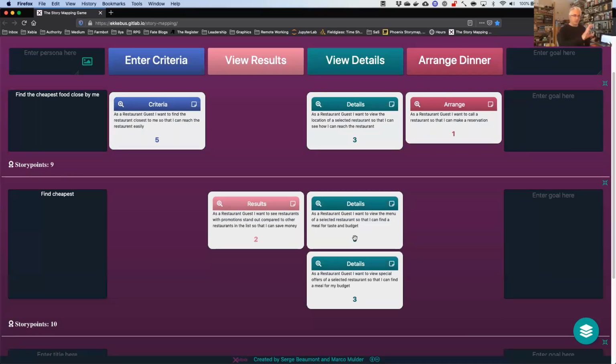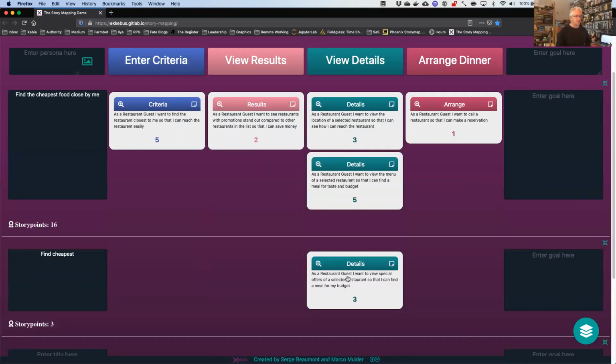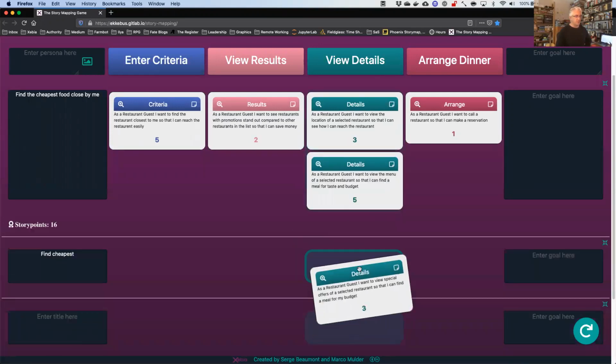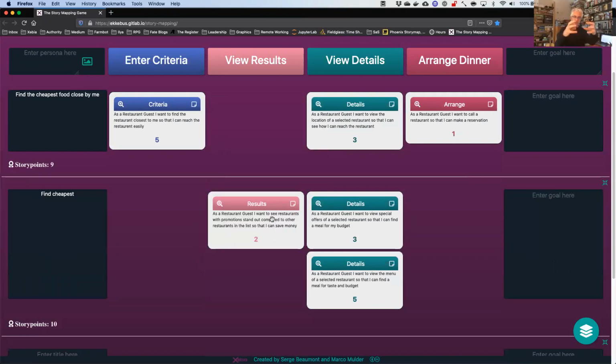So the slices don't have to really map onto a sprint, right? If their velocity is 20, they could do both slices at once, and we could basically do this again. We can keep it like this and keep the old definition, but it's really up to the team and up to you to figure out how you want to slice it, how you want to keep things together, what makes sense, right?